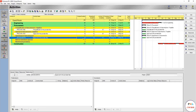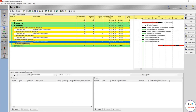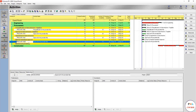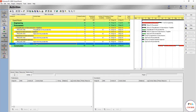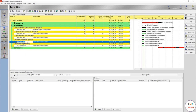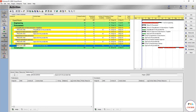The appointment of subcontractors activity — representing the subcontractor coming to site — takes about 6 days. We assign ID 1020. Then material submittal and approval gets ID 1030, and manufacturing and delivery gets ID 1040.